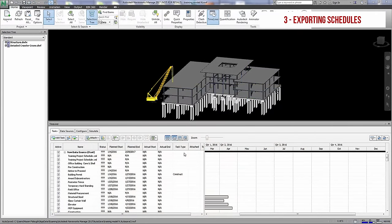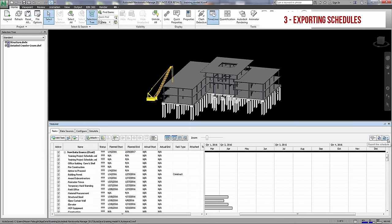Timeliner, on the other hand, will only allow you to export CSV or Microsoft Project XML.